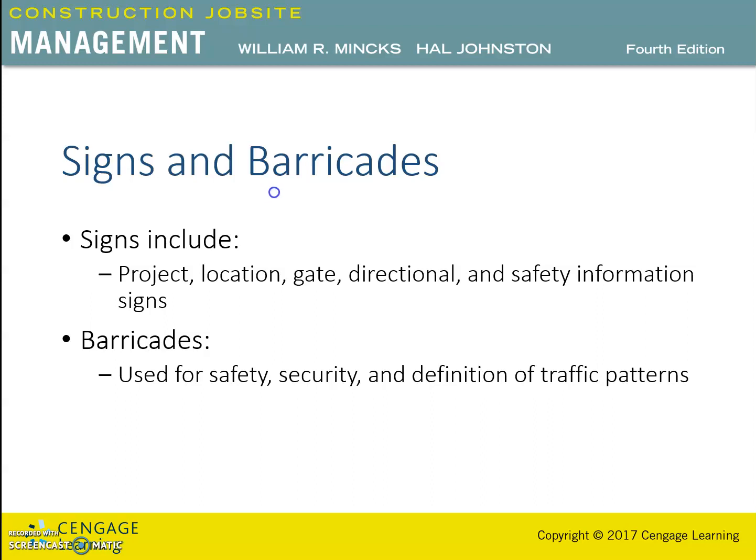Location signs, miscellaneous signage on the roads to indicate the route to the job site for delivery trucks. Gate signs. Some gates are restrictive regarding which companies' personnel can enter. The gate signs normally list firms that are required to use the gate. This provision is used when both union and non-union contractors are working on the same project.